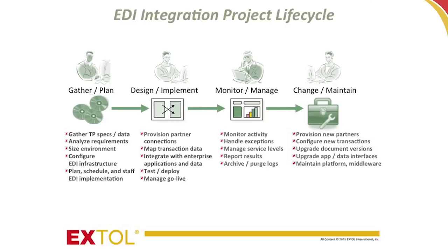So let's talk a little bit just about the project lifecycle. When we think about a new engagement on the EDI side, we're engaged with a new customer, and whether we're using JDE or any other application that we're integrating with, it could be a homegrown system, it could be any one of the applications that are out there, in general, we try to keep the same mindset, and we go through at a very high level the gathering planning phase, the design and implement phase. Once we go live, we monitor and we manage transactions, and then we have change management and maintaining objects.